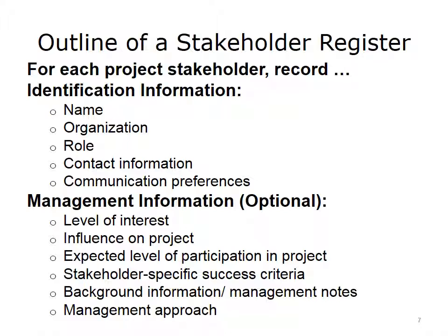Keep in mind, if documents like this are part of projects funded by government agencies, the stakeholder register may be open to being accessed by way of the Freedom of Information Act. Keep in mind the sensitivity of any information that you include.